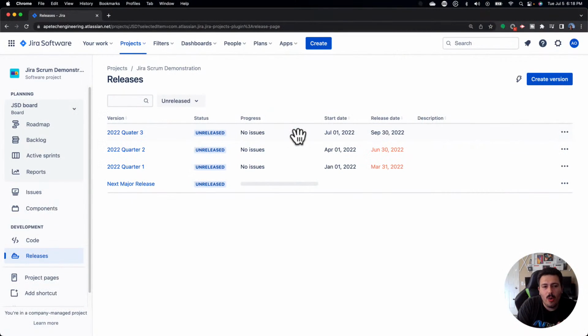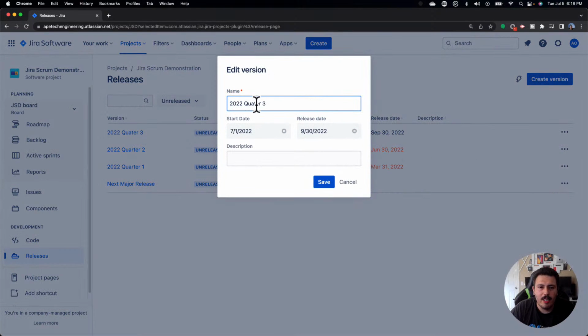Those are two separate things. So these releases are really dedicated, and the utilization with my tactic is to save it for the epics. The stories, the tasks, and the bugs can still have their appropriate 1.0 release, whatever naming pattern and convention you have for those releases, you can absolutely still have those, right? But I like to do it at the quarterly level for the epics, okay? Because this is really where I'm just thinking more strategically, and you guys can tell me.